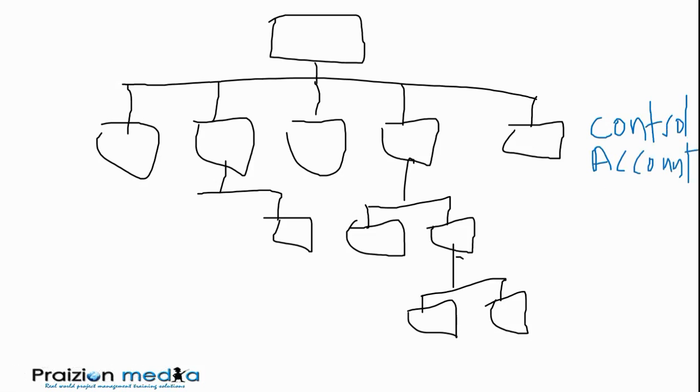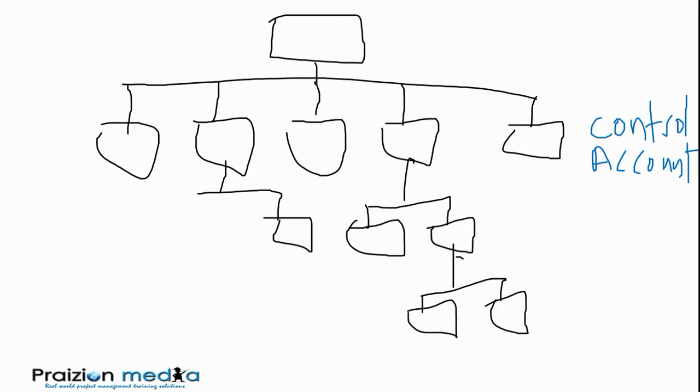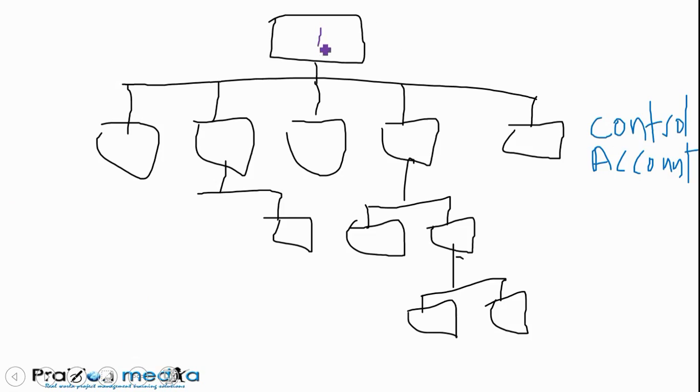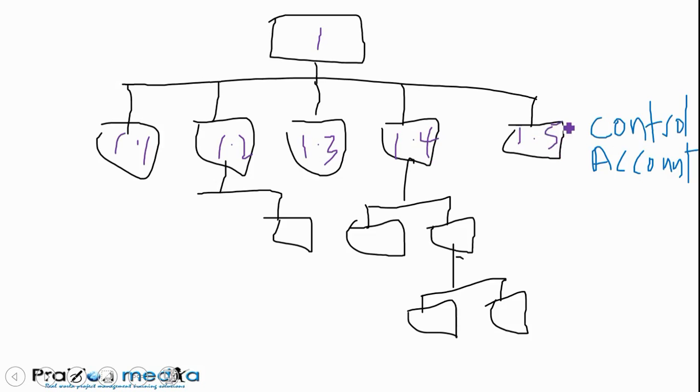What is a control account? A control account is a management point in the WBS that is used to track time, cost, and scope performance. The control account has been tightly associated with the earned value management system used in a firm. We know this is 1 at the top. Going back to our numbering, that's 1, that's 1.1, that's 1.2, 1.3, 1.4, and 1.5, for example.